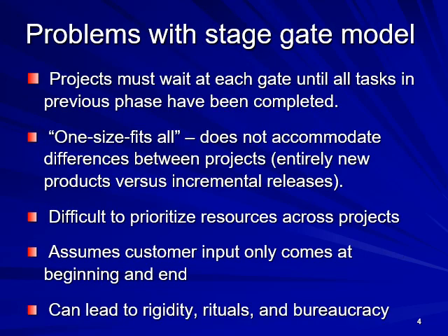Okay, what are the downsides of the model, of the stage gate model of new product development? Well, the number one downside is that it's a very linear process, right? Except for this loop that I was alluding to between development and testing, for the most part, you need to go through each of the stages. It's a very bureaucratic system that everything is laid out and is somewhat rigid, right? So this doesn't add a lot of flexibility to the product development stage, and if things are changing in the marketplace, it's going to be hard for us to react quickly when we have a process like this.